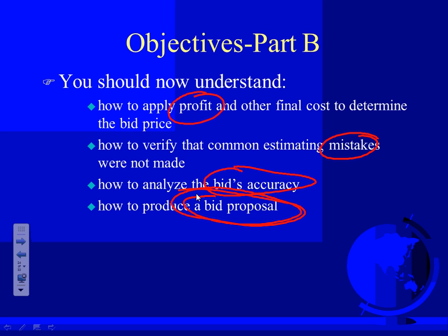I've been going through it real quick. Pay attention to E and C and M. These are very important for math. Same thing here, for example, the quantity here. Oh, I'm sorry, I actually went back here. The extension is equal to quantity here, times the labor here, and enter. That's labor, that's not a dollar amount, just general. These are hours.